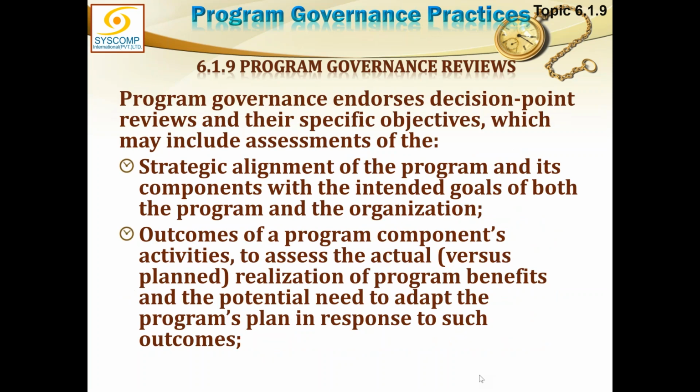Program governance endorses decision point reviews and their specific objectives, which may include assessment of the strategic alignment of the program and its components with the intended goals of both the program and the organization, and the outcomes of the program component activities to assess the actual versus planned realization of program benefit. Now we are not talking about the product, service, or result.